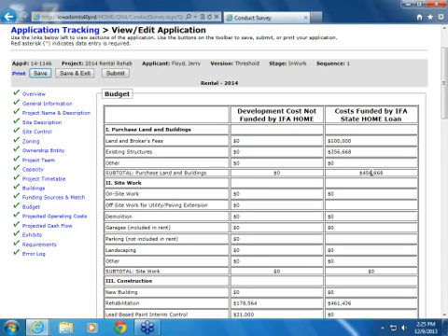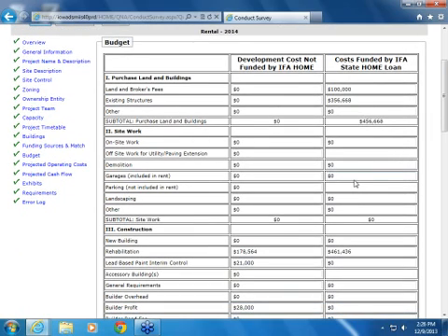Back to our point about we like hard cost in the project reimbursed with home. Acquisition is an allowable expense. It's real hard for us to dump the majority of our home funds into a project right away, though, whenever no work has been accomplished on the project. So back to the fact that we'd like to reimburse for materials. We can reimburse for acquisition, but it's not the preferred method for the majority of the funds.